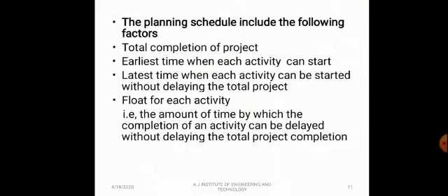Float is the amount of time by which the completion of an activity can be delayed without delaying the total project completion. It is called the float for each activity. We can start the work late, but it should be completed on time.